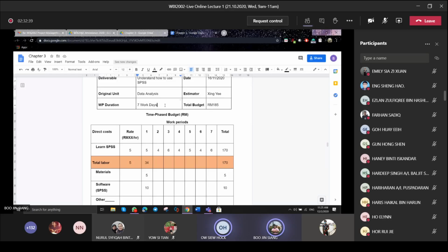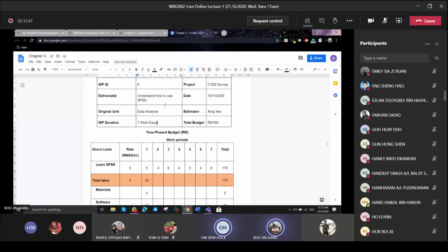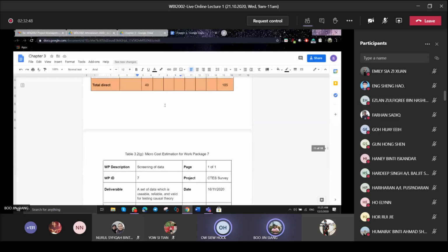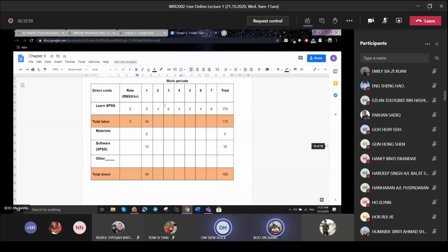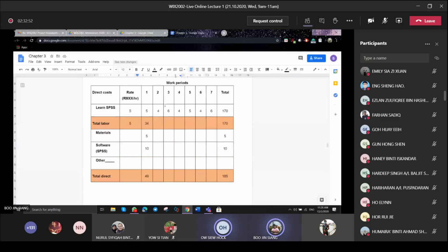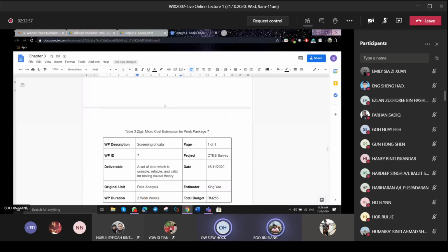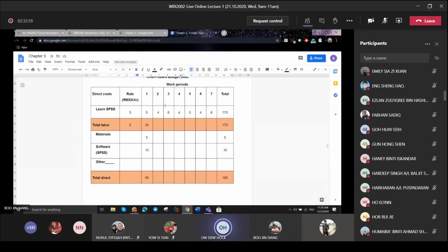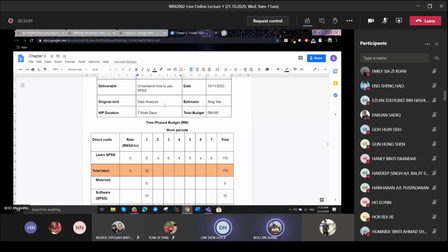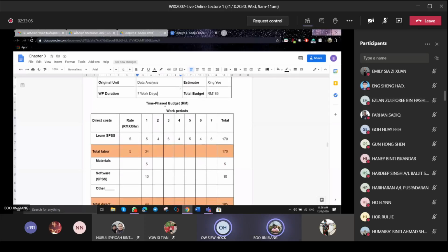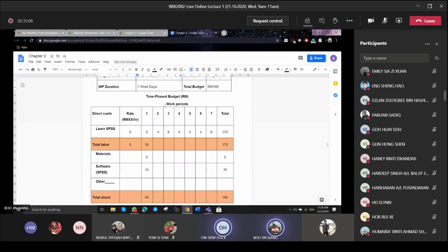Because now you have to standardize in your WP. Okay, let's say your 7 work days, is it equivalent to 1 work week? That means 1 week you work for how many days? Is it 5 days or 7 days? Friday, I think. Okay. So that means 1 work week is 5 days, but here you put 7 work days. Then you have to drag on until the second work week, because if 1 work week is 5 days, this one in this sheet here you got 7 work days.